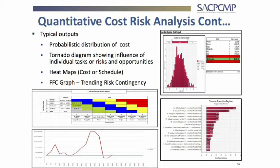Not all risks happen at exactly the same time. So why is it 250 million? Well, last month you fired the engineers on site — now we don't know what to build, we have technical queries. Or it's June/July striking season: petrol bombs were thrown, excavators burned down, site is standing. We're being knocked hard on cost and schedule.